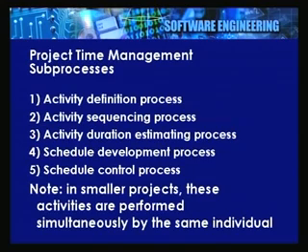If the estimated completion date for a project was to change significantly, it is very important for a project manager to go back and renegotiate the triple constraint of scope, quality and time with the top management. So, now let us look at the slides and see what the main time management sub processes are.